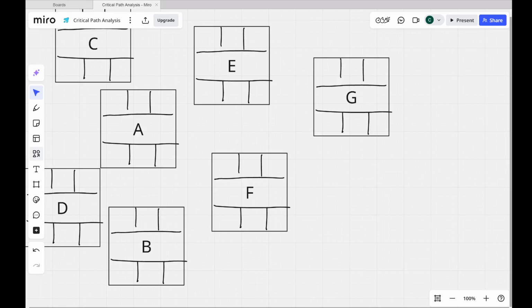A couple of things you'll need to be familiar with prior to this, to make sense of anything we're going to go through, is the work breakdown structure. A very brief summary: there's a hierarchy, a hierarchical diagram showing all the tasks we've identified or think we need to do to deliver our project. What it will not show is the order. The work breakdown structure is a family tree, is how I've always remembered it: a hierarchy with the highest level of detail at the top, and the lowest level of detail, the most information, at the bottom. As I said, it doesn't show any order, though.